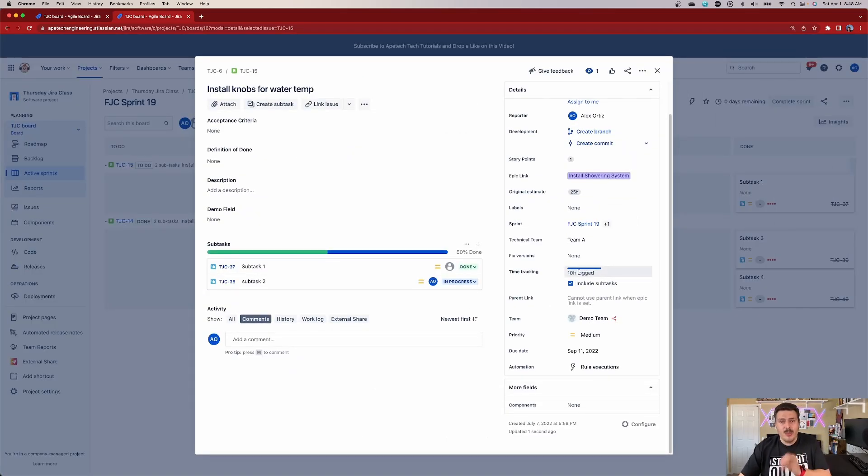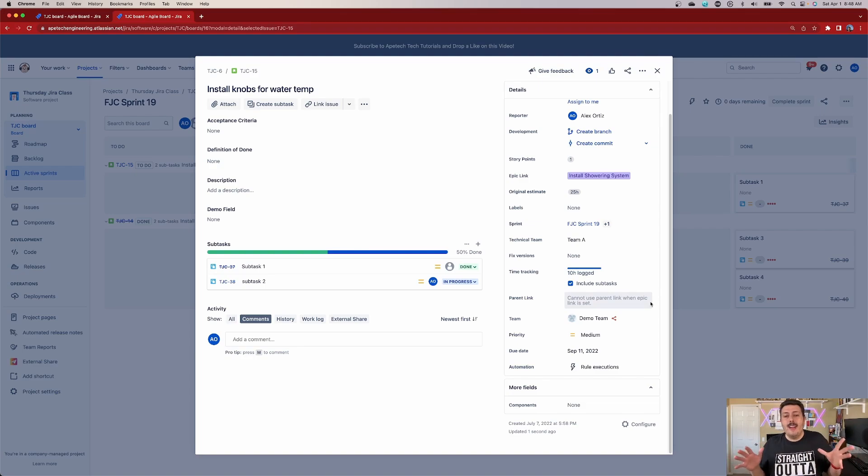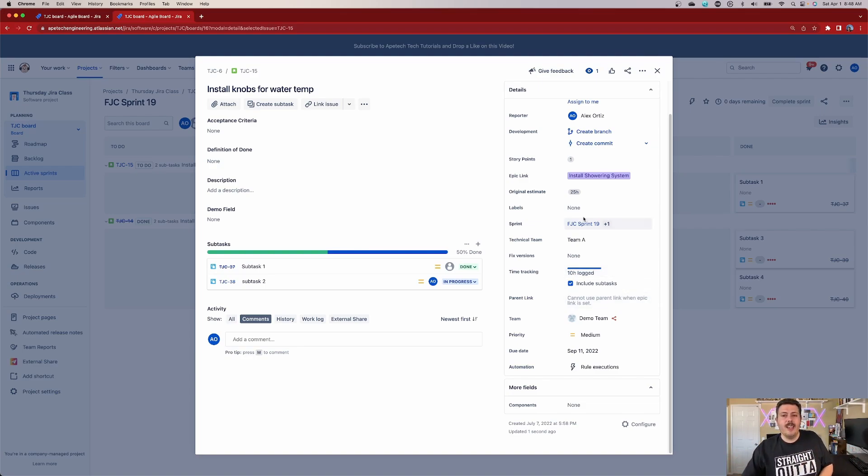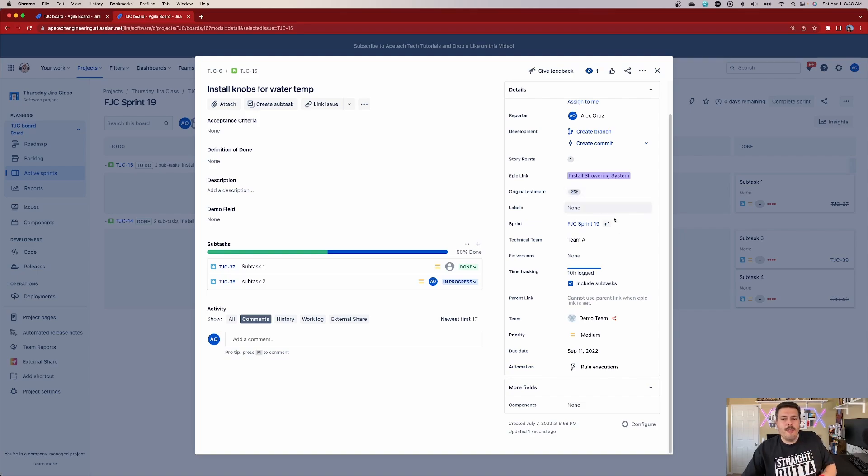And this time tracking is now showing 10 hours. This is really, really good. This is great because now I know how much effort is being logged against this thing. And I know that I was supposed to have an original estimate of 25, which means I'm almost halfway there.